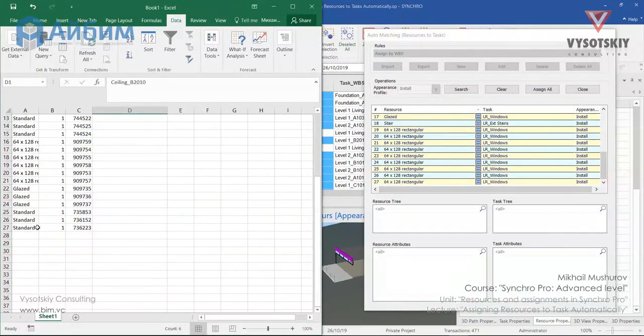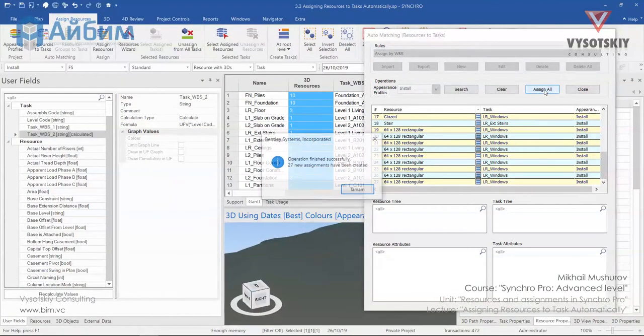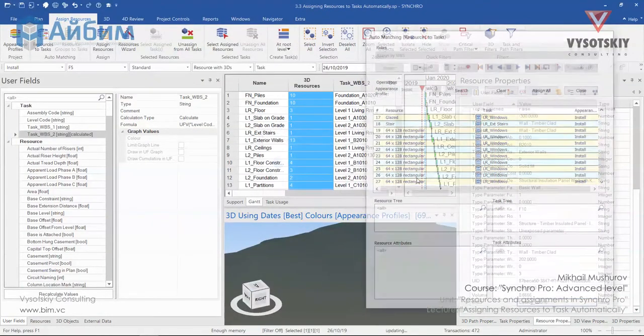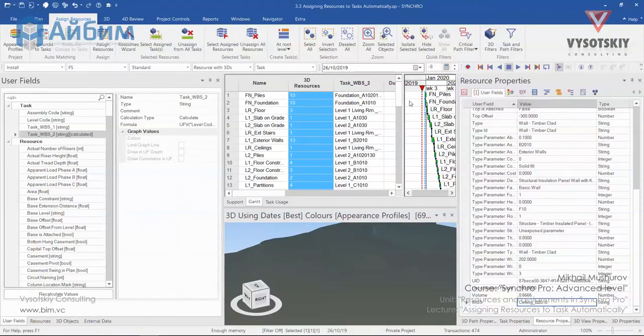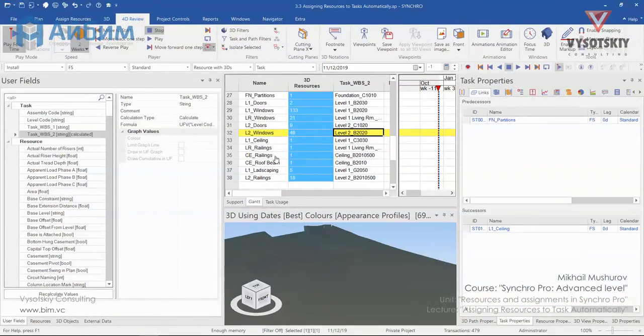Yes. 27 elements. So click over Assign. And now it's finished successfully. So all resources have been assigned to a task automatically. And now we can play our animation.